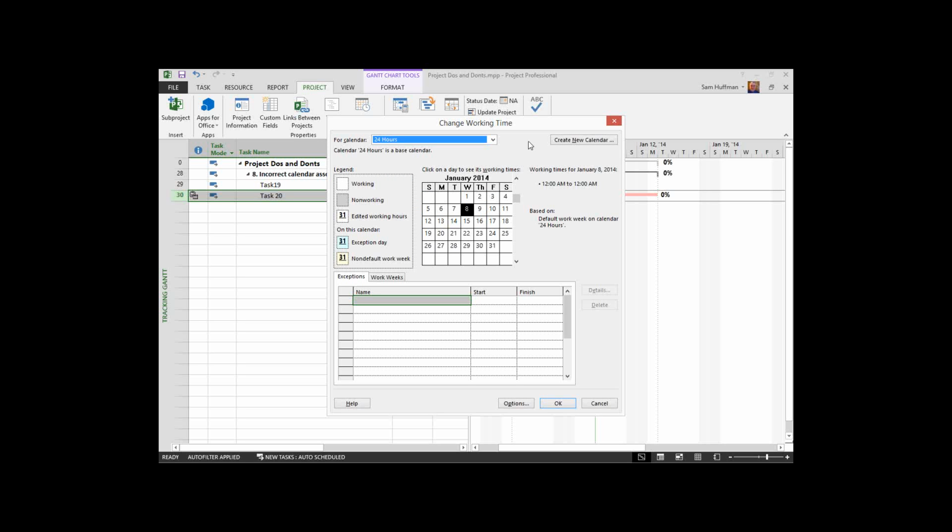So let me give you, as a last step here, the hierarchy. First of all, the project calendar. We set the project calendar to indicate working periods. It's designed to capture all the working periods. If there is a non-working date, like let's say today was a non-working date, then that would be an exception that everyone would not work. This is a 24-hour calendar, and as you're seeing here, every day is a working day. The standard calendar, the project calendar, has Saturdays and Sundays off. No work, just during the work days. The project standard calendar is the base.